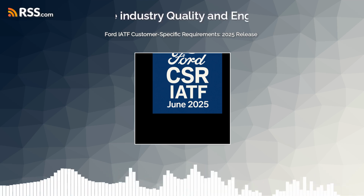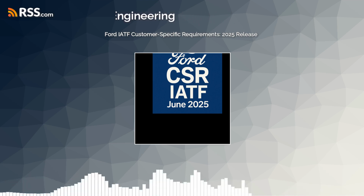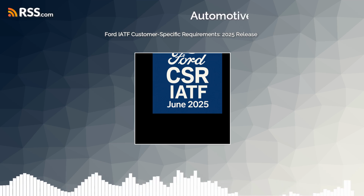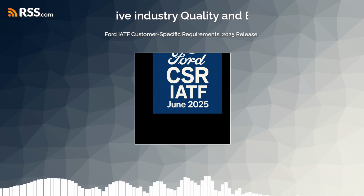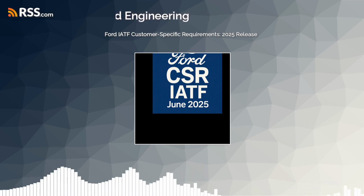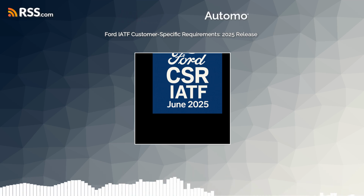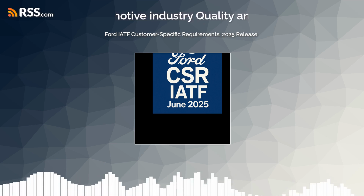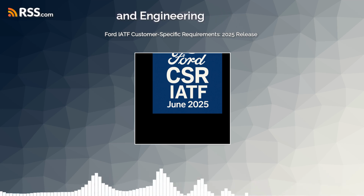Ford understands that prototypes are part of the development journey. They're not always perfect first time. Ford PD engineering can approve the use of non-compliant prototype parts for evaluation or testing purposes, but it's not a casual sign-off. It requires a formal process documented via a WERS alert, the Worldwide Engineering Release System alert. This creates a formal record of the deviation and its approved use, ensuring traceability even for non-conforming prototypes. Everything gets documented. It seems like everything is tracked, even temporary deviations.